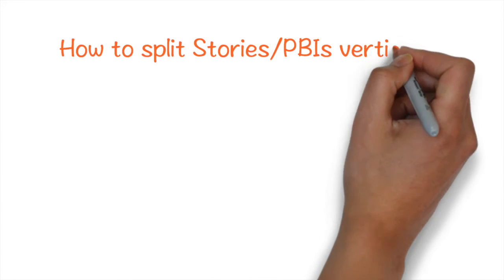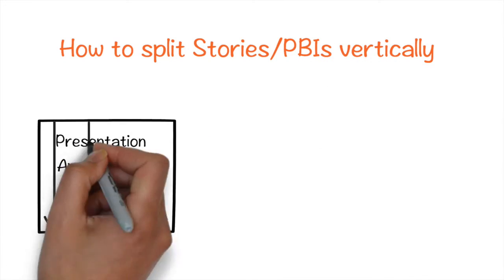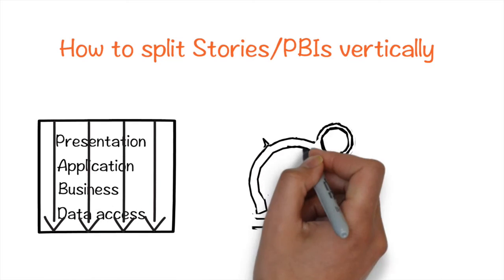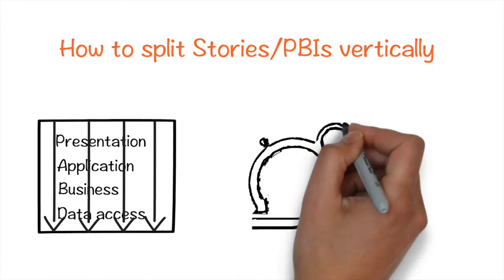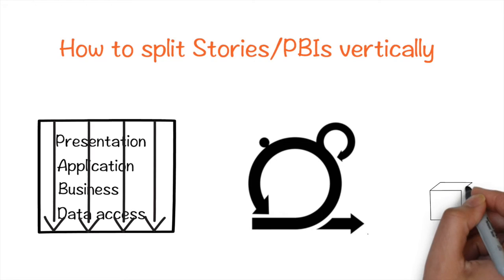In Agile, we need to break down stories vertically so that at the end of every sprint, we have working code which delivers a minimum user functionality. The minimum user functionality may not be sufficient to warrant an external release, but we need to slice stories such that with every sprint, we keep building up the functionality till it reaches the minimum marketable feature, where we can go for a GA.